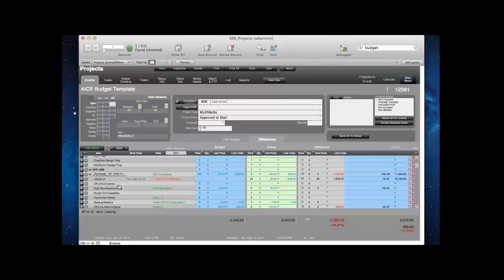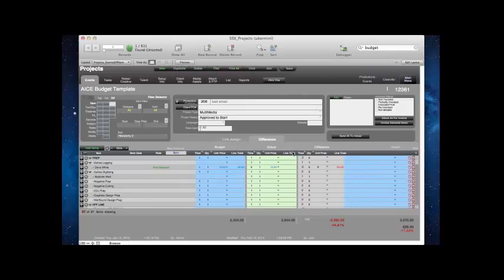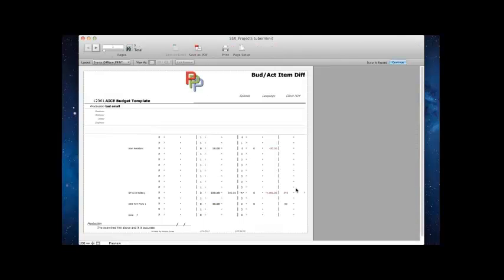Go down. So DigiDesign, we budgeted 50 hours at 100. We ended up using 3 at 100. So we were 47 hours less than we thought, for a total of $4,700 less than we thought. But if we did the 3 hours at $340, which is the market rate, what everybody else is charging, 3 times 340 equals 1,020. So that's how the market rate works. And when you print this out, I think it will include the market rate. Let's check. If it doesn't include it on this printout, it will be on another. Yeah, so there it is right there. There's the 340 that we talked about.